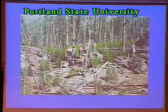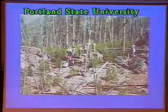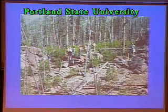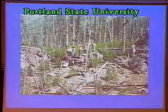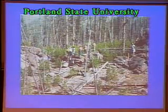And for most parks, we've got wetland specialists. We have to do the wetland delineations around the project to make sure that if we do impact wetlands, we replace them, in kind, somewhere else within the park. Cultural resources, both historic cultural resources that in some cases tie in with the roads or buildings, and then the prehistoric resources from the indigenous people that lived here earlier.